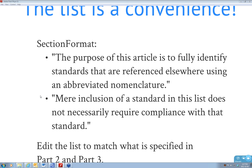I usually set the date as the date of the documents rather than the date of bid opening, notice to proceed, or signing the contract, because there can be significant delay between producing the documents and actually going out for bid. That makes a lot of sense—I think I'll go back and make sure that's what I'm doing.